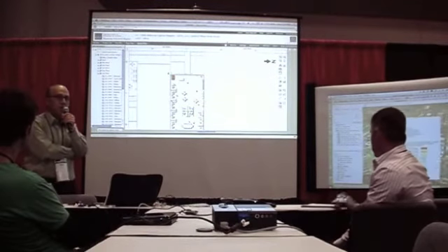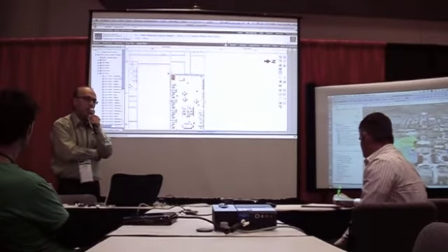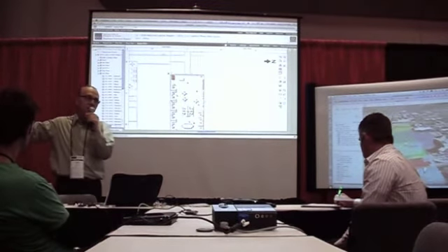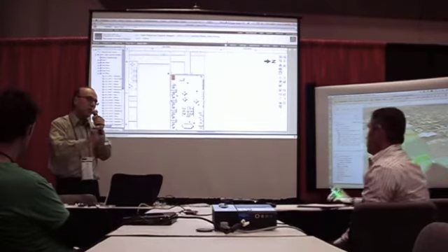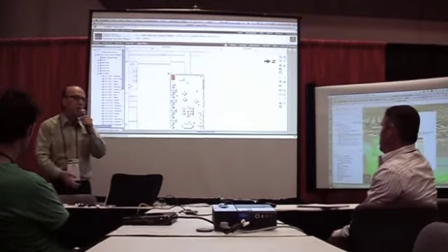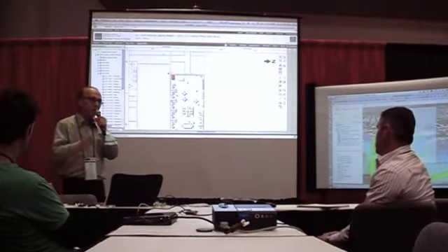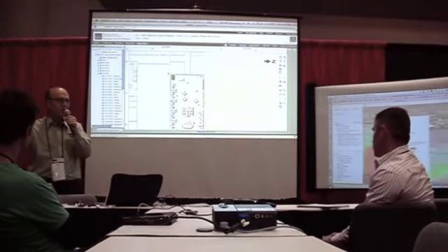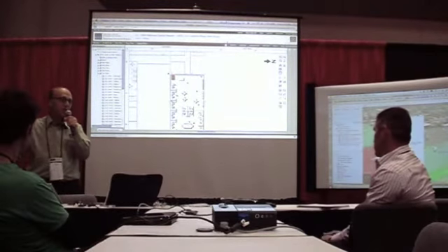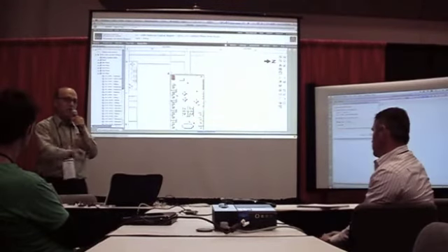So in our other conferences, we had a similar demonstration with a group called Tokomo where they were doing cost estimating. So imagine another cost estimating system, another database that says, we're doing costs, we want quantities from your model. As you're doing the model, we don't care about how pretty it looks or what the layout is. We just want to know how many square feet of carpet are in this building. It's just a simple request that they get sent back and said, on the third floor, there's this much carpet, this much square footage, and say, okay, here's the cost for that. And you do that for the whole building, you start getting this kind of a real-time interaction.